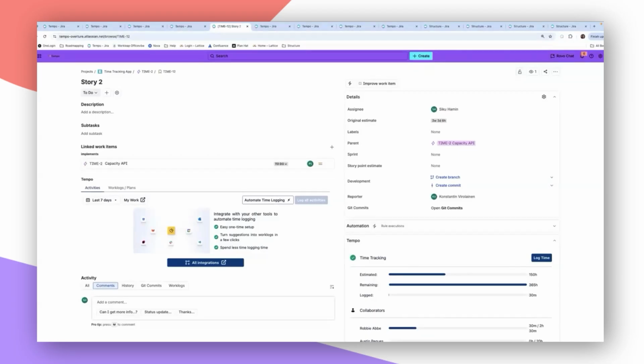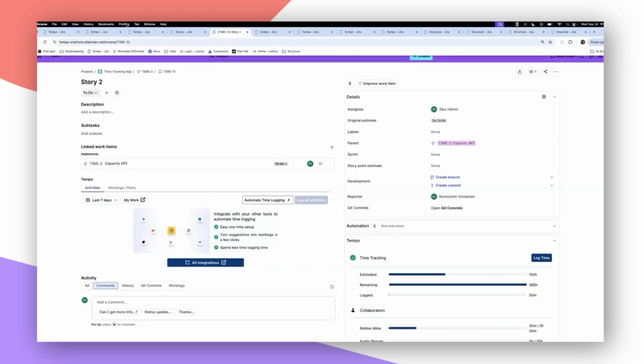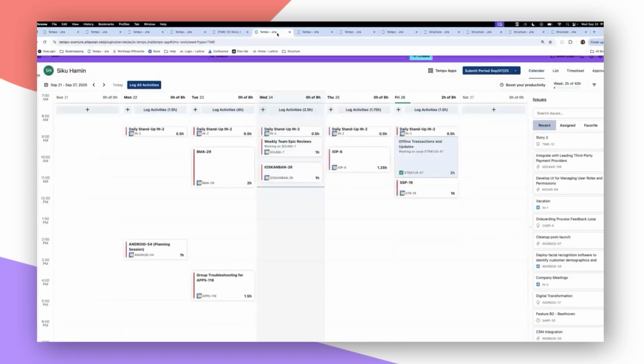And the best part about that is when you have both Capacity Planner and timesheets working together, you can start to measure that variance. That's where you can say, here's what we planned, here's what actually happened, and here's why that happened. Now, timesheets is going to be your foundation because at the end of the day, everything starts with time. If your data is messy, inconsistent, or incomplete, everything downstream, like your capacity planning, billing, and forecasting, gets a little shaky. And to be honest, time tracking is never the part of anyone's job that they're most excited about. No engineer is going to wake up and say, I can't wait to log my hours today. But the reality is, without accurate time data, every other decision starts to unravel. You can't compare plan versus actual, you can't forecast accurately, and you can't control cost.